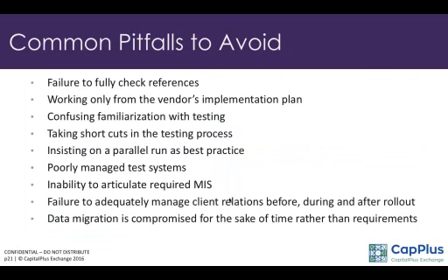You develop that plan and you look at the vendor implementation plan, which goes into great detail, and then you merge the two plans together and you manage that plan. So it's not the vendor's plan, it's not just your plan only, it's a merged plan of both tasks and responsibilities. When you put that down, you can calculate the critical path. What are the critical activities? All those things can be identified.